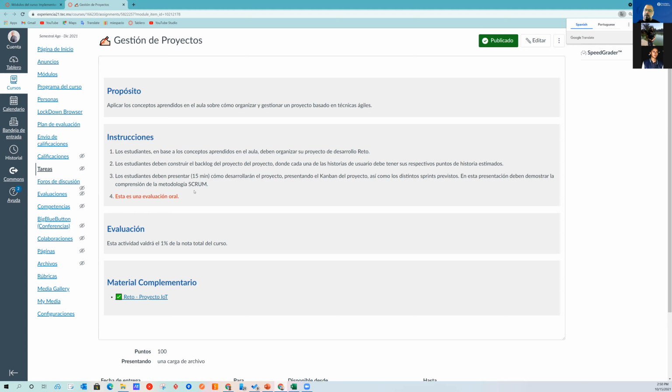And you create all of the sprints that you have until the end of the course, starting in the first week after the Semana. Okay? And in the product backlog, you estimate how many story points each user story has.